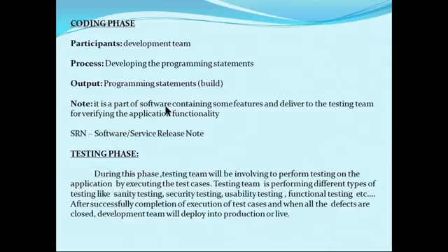Along with that build, we are getting an SRN also. SRN, software release note or service release note. People call it software release note or service release note. Remember, the testing department especially, don't accept any build from a developer without an SRN.